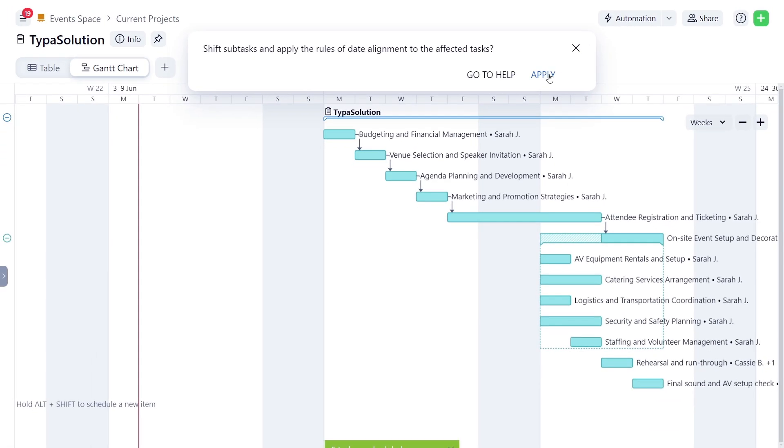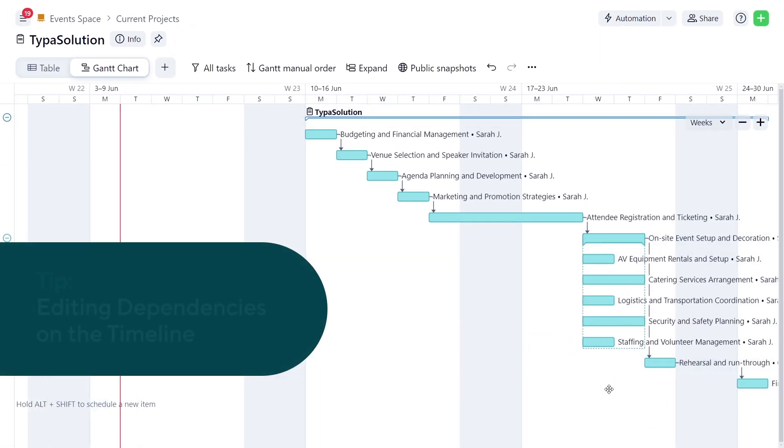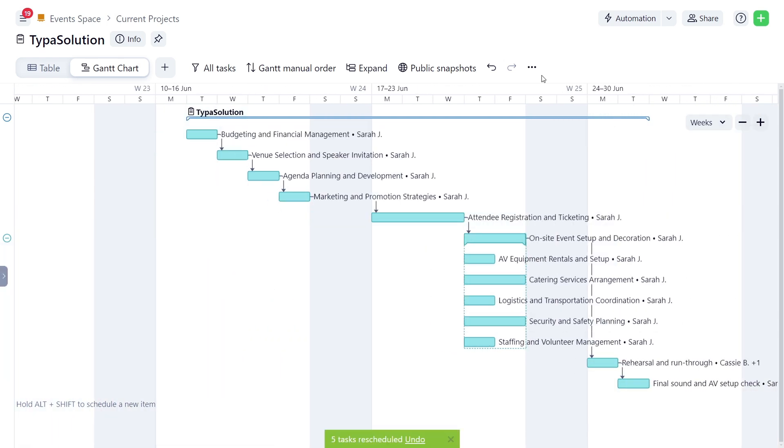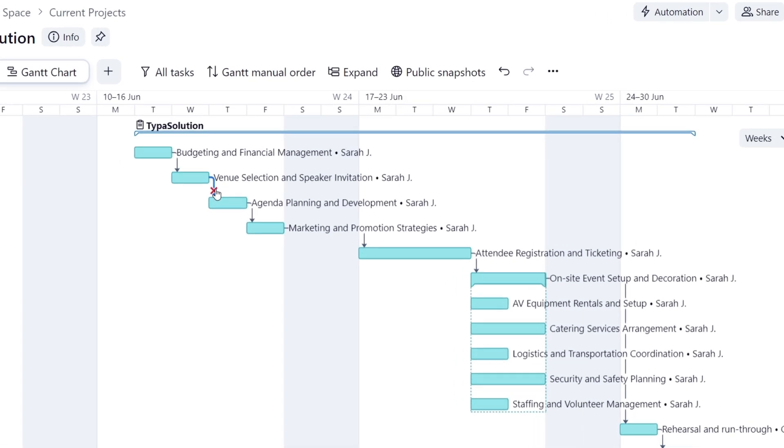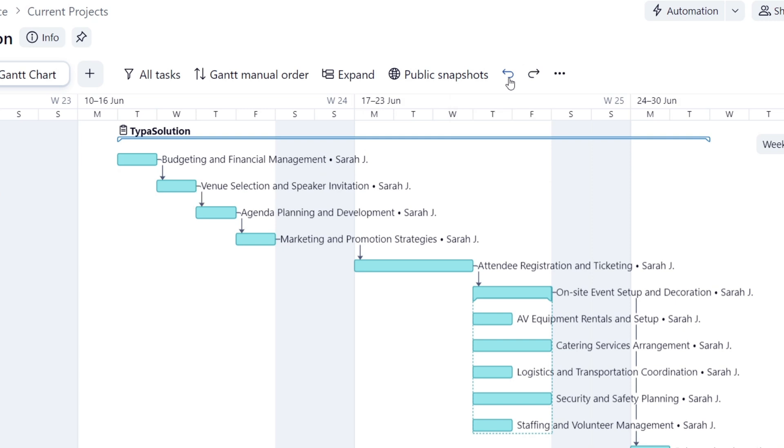A few tips. To reschedule dependencies, simply adjust the entire dependency chain at once. To remove a dependency, click on the arrow and then on the cross that appears. To undo your actions, click the Undo button here.